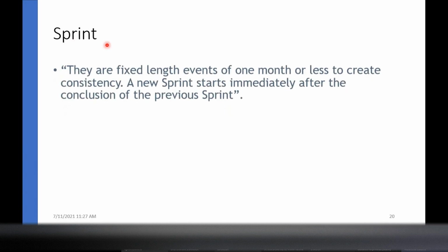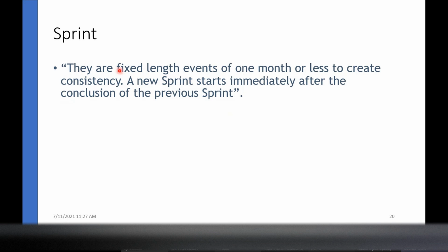Sprint. We will discuss what a sprint is. They are fixed length events of a month or less to create constantly. A new sprint starts immediately after the conclusion of the previous sprint.